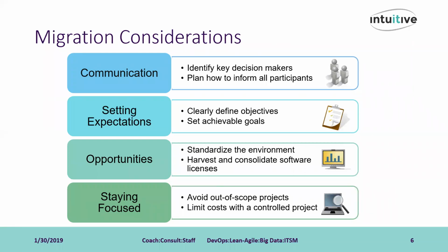So prioritizing the easier business lines to get off to a good start is always key here, and establishing some quick wins always helps the project move along smoothly at the outset. Becoming bogged down in the more complicated business line migrations early on can create that perception of a mismanaged project. So we typically will start off with the easier departments and move forward from there.